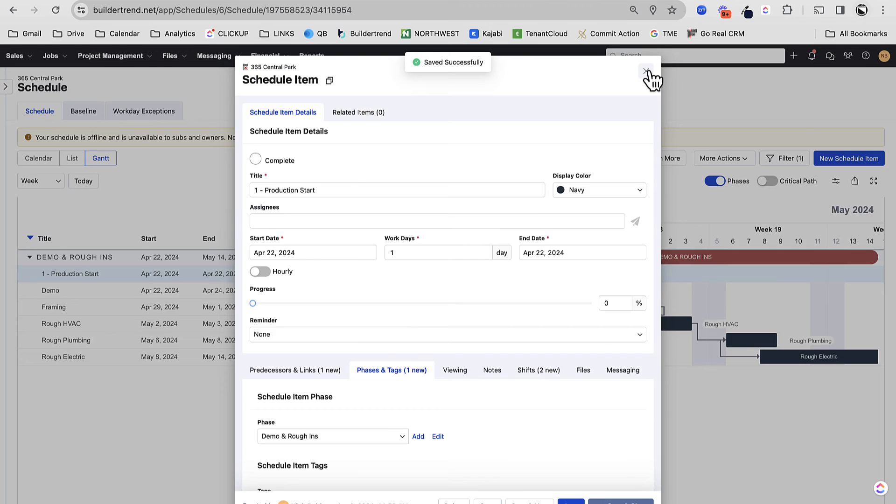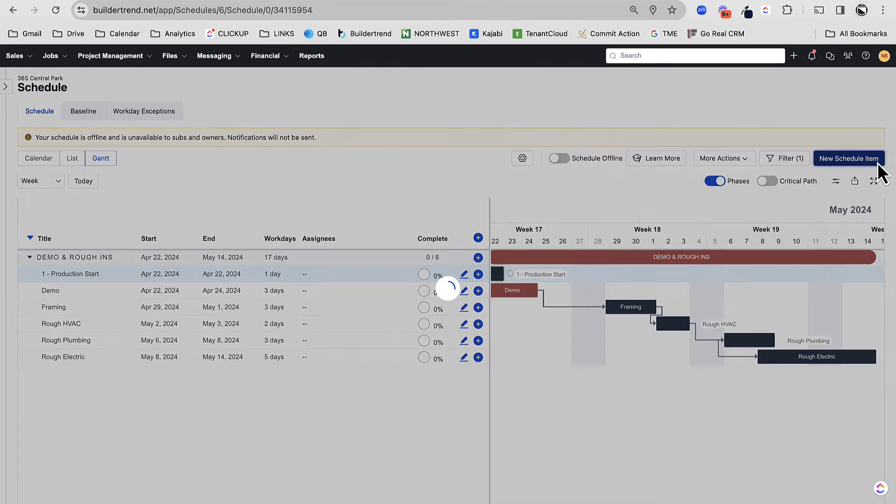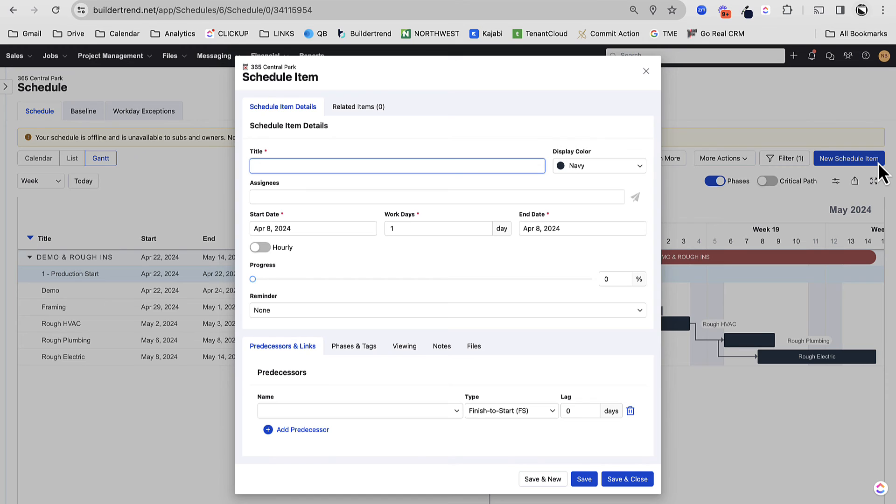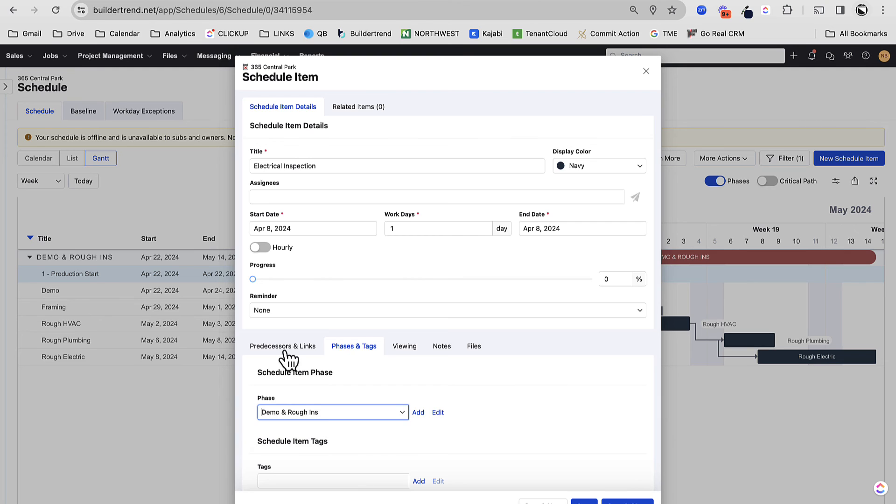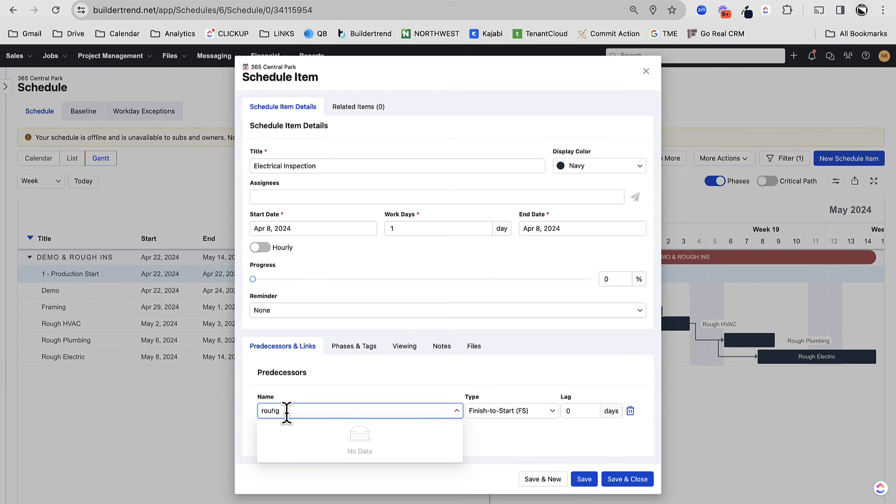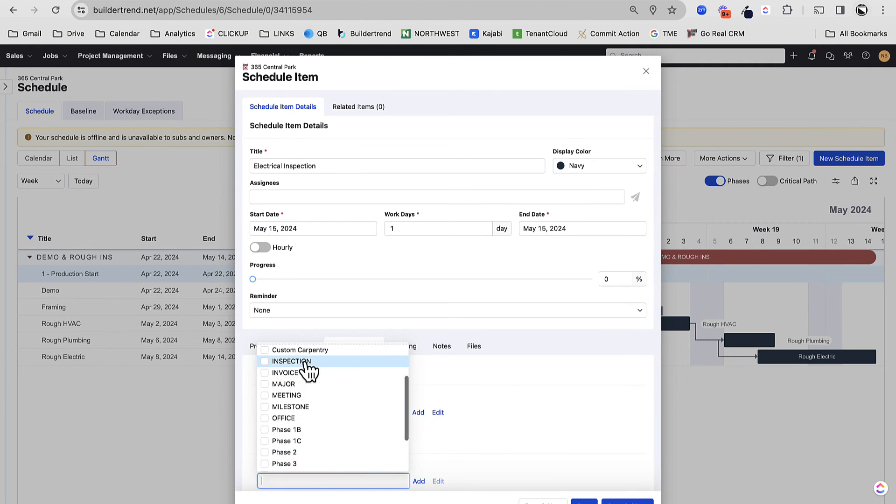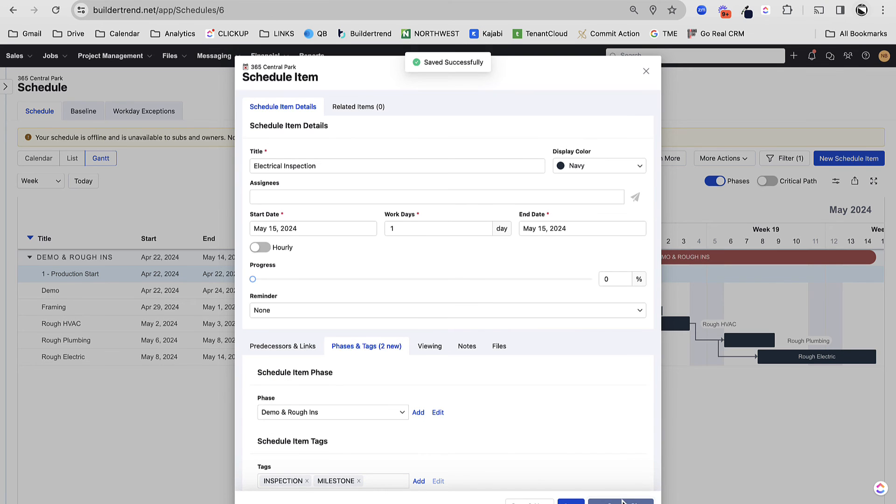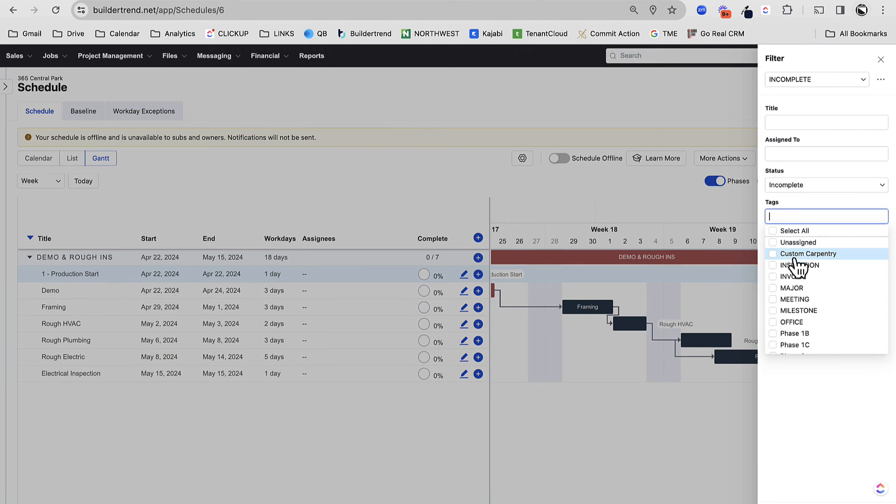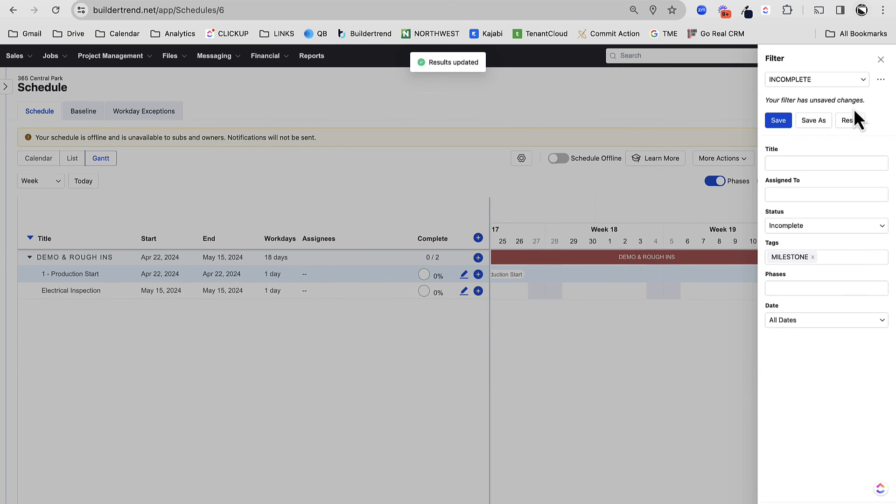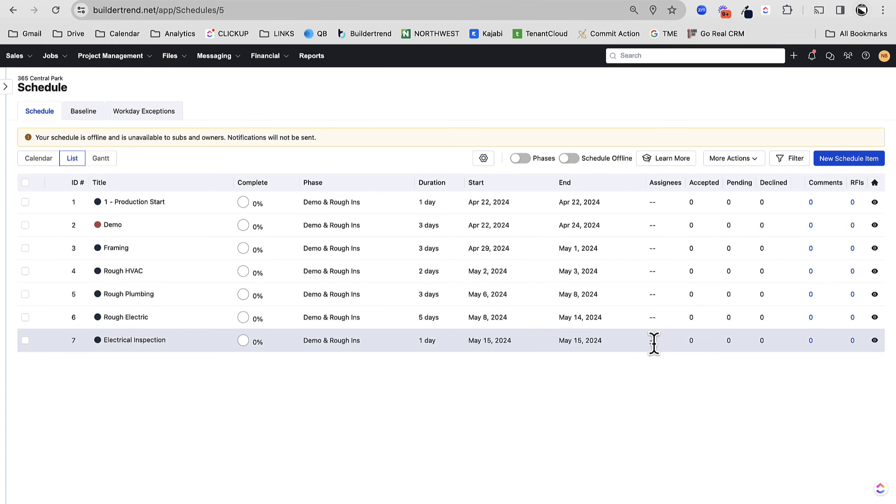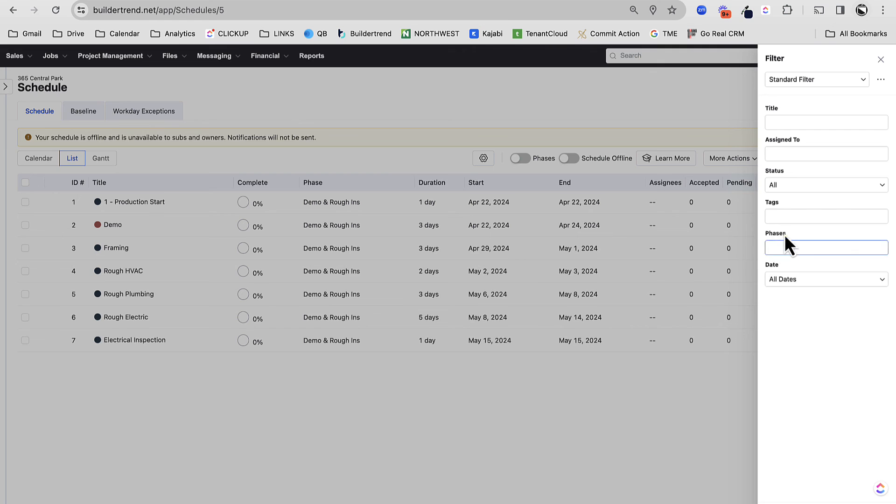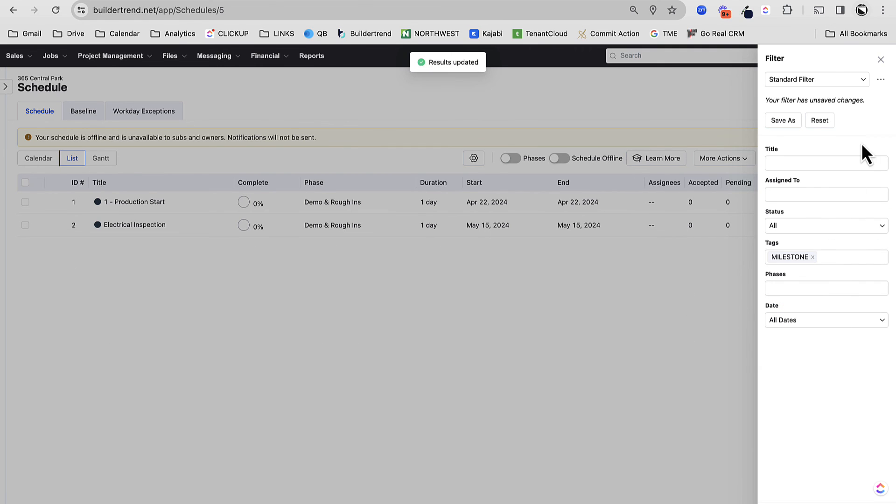We could have another milestone, for example. We could say that like we have an electrical inspection. Maybe I'll leave that one navy. And that's dependent on my rough electric. That's demo rough ins. And that's dependent on my rough electric once rough electric is done. And maybe this tag, you could have as inspection and milestone. And this is an example where now I can take my schedule, whether I'm on the Gantt or on the list, and I can filter and I can say give me anything that's a milestone and apply that filter. And that'll give me those. And that's really useful if we're looking at like a list.